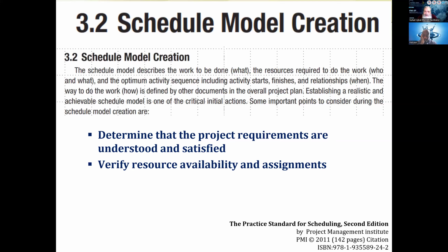And then throughout the project, you keep revising it and refining it. So it goes through many instances. But the instance which is considered final for planning is called the baseline. You remember that. After it has been baselined, no more instances can be created. They can only be created in case of a change request, which will be approved by the highest authority.